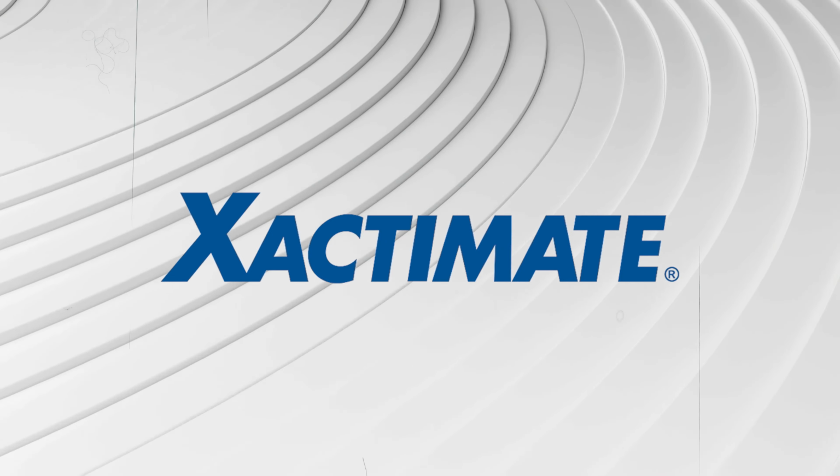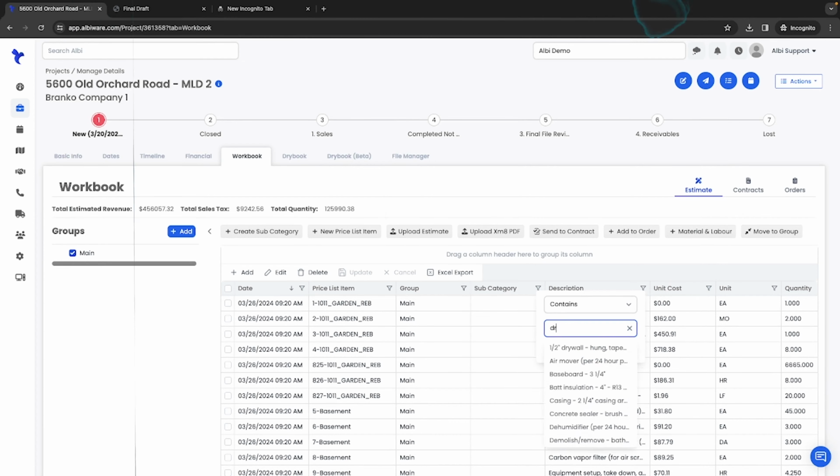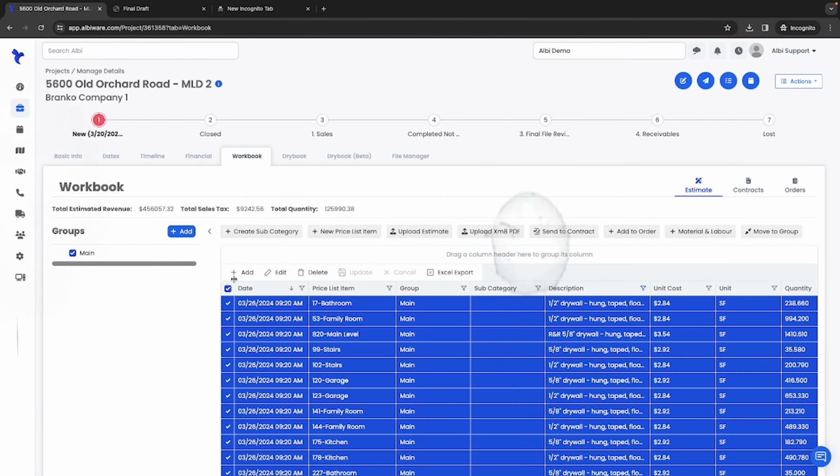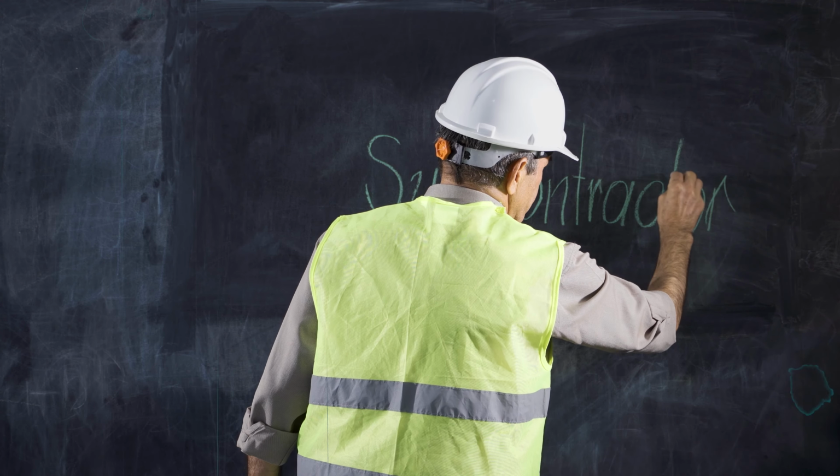So overall, the step-by-step process: taking this big Xactimate invoice that is very intimidating, splitting it up into these different work orders. Instead of just randomly applying a percentage of budget, you actually methodically apply a percentage of budget to each one of them. Then you go to your subcontractors and sign contracts with those subcontractors to bind them to that dollar amount. Then you implement something like job costing to make sure that you have a way to track every single expense that happened under that project. If there are any change orders, you're going to go in and execute a change order with the subcontractor and you're going to go supplement the insurance company.